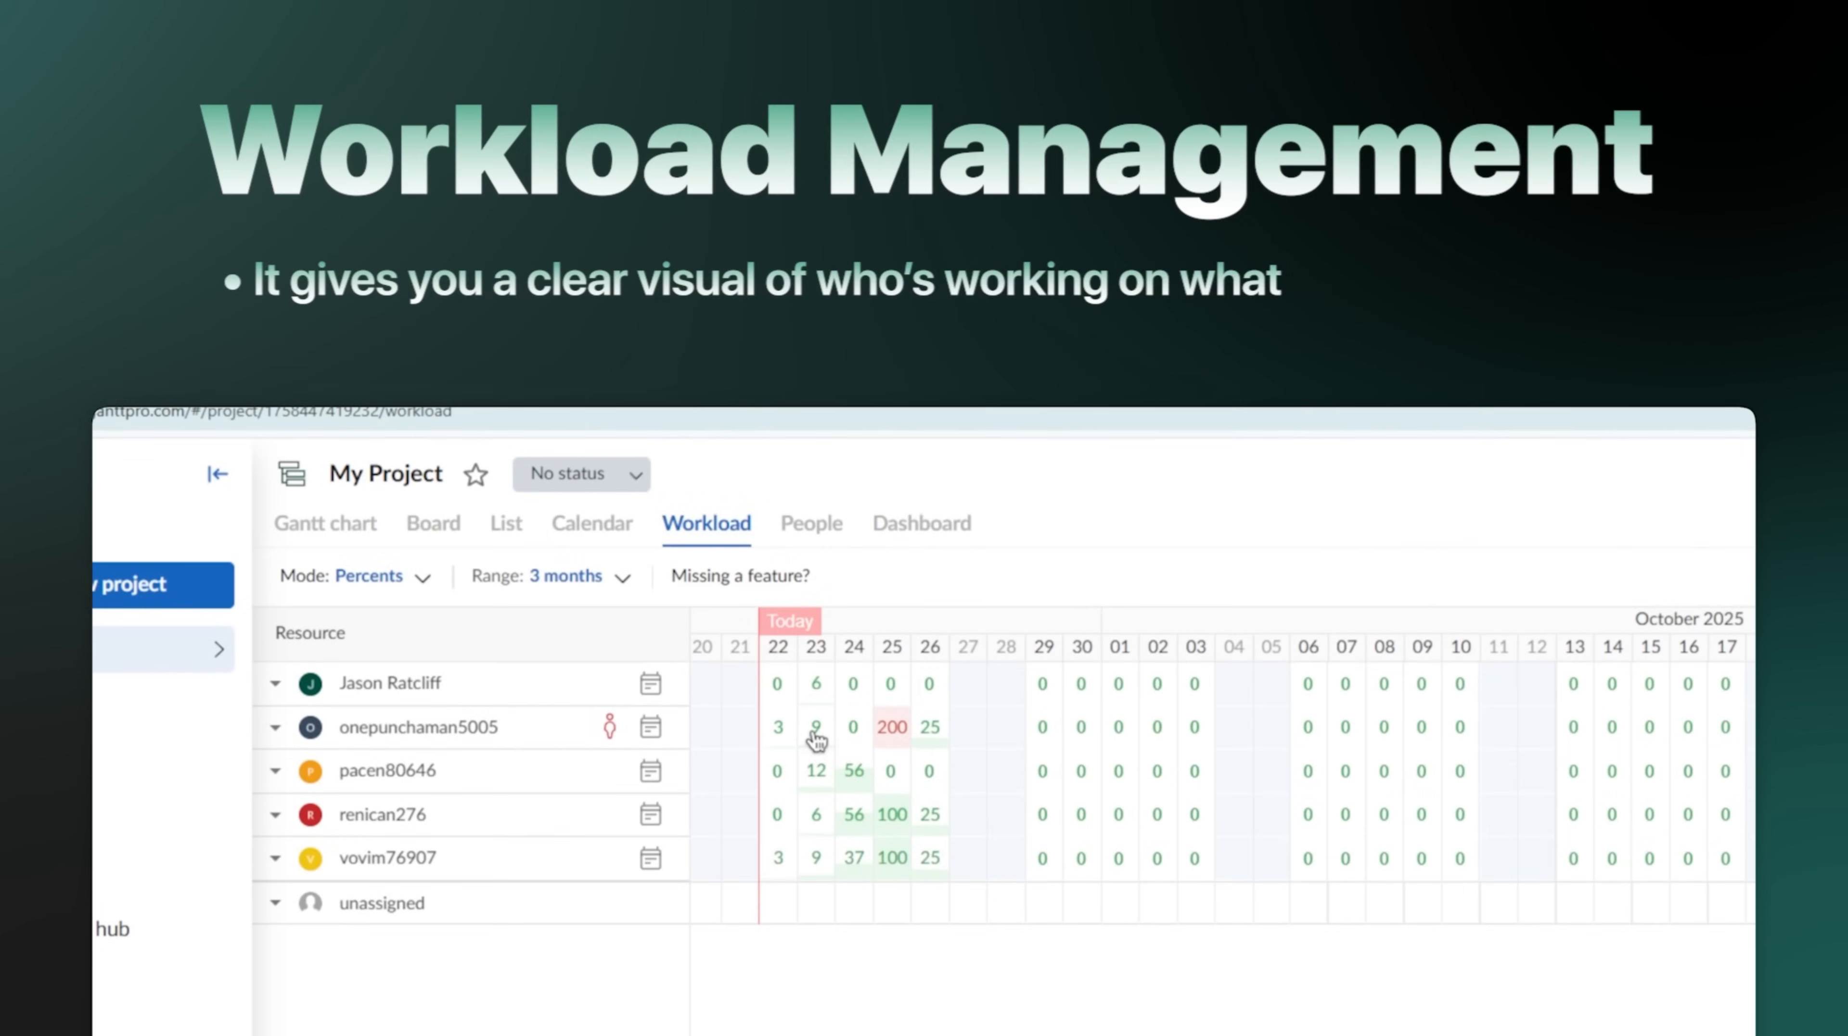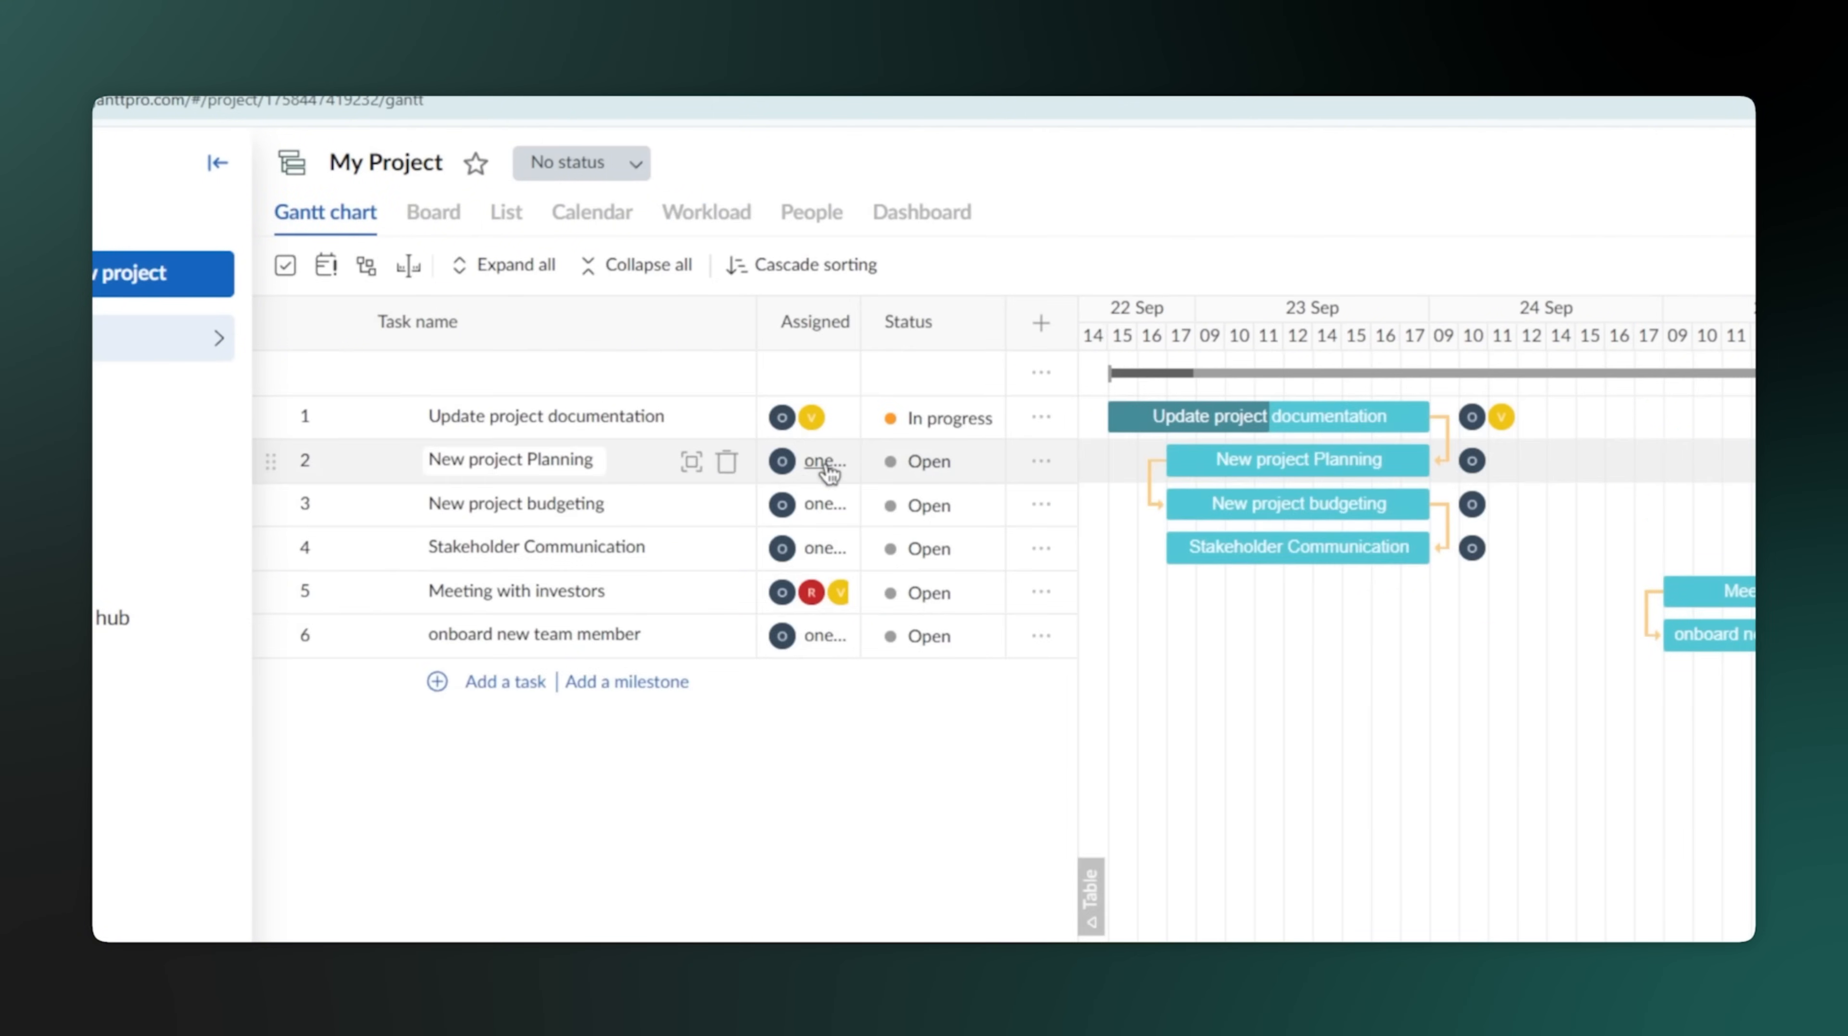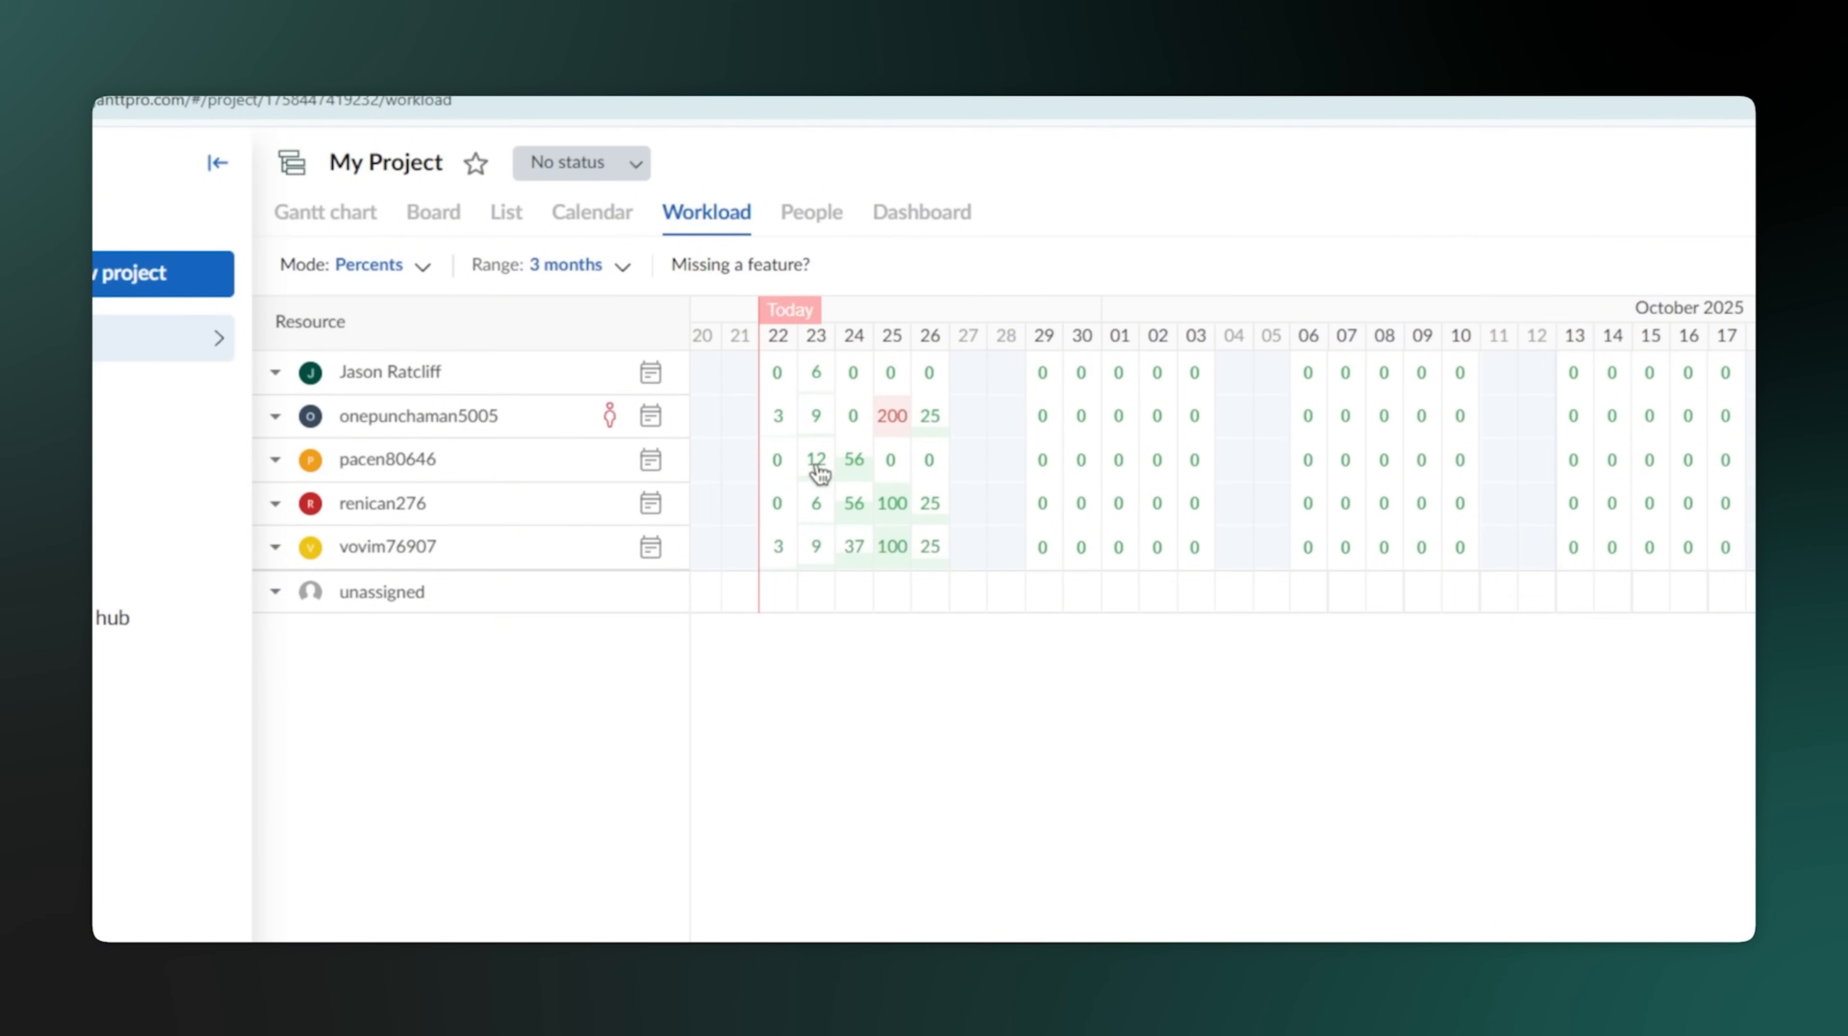It gives you a clear visual of who's working on what. You can see how many hours each team member is assigned and quickly identify if someone is overloaded. If you see a team member is at 120% capacity, you can easily reassign a task to someone who has more time. This ensures your team stays balanced and productive, preventing burnout and keeping projects moving smoothly.